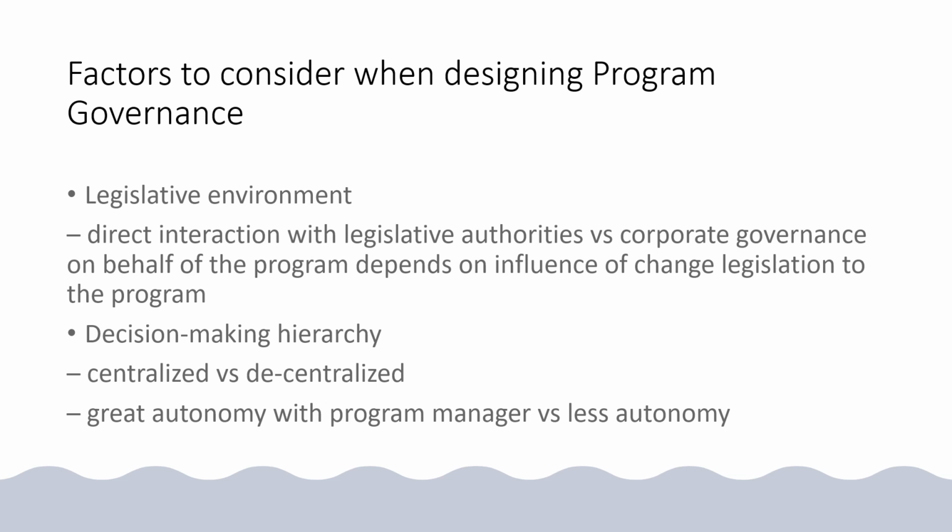It depends on the portfolio in which you're operating, the program in which you're operating, and the size of the organization. Everything matters. Both centralized and decentralized have their own pros and cons. When you decentralize and give greater autonomy to the program managers, the team will have more accountability and more decision making involvement. So most of the agile programs today recommend decentralized decision making.